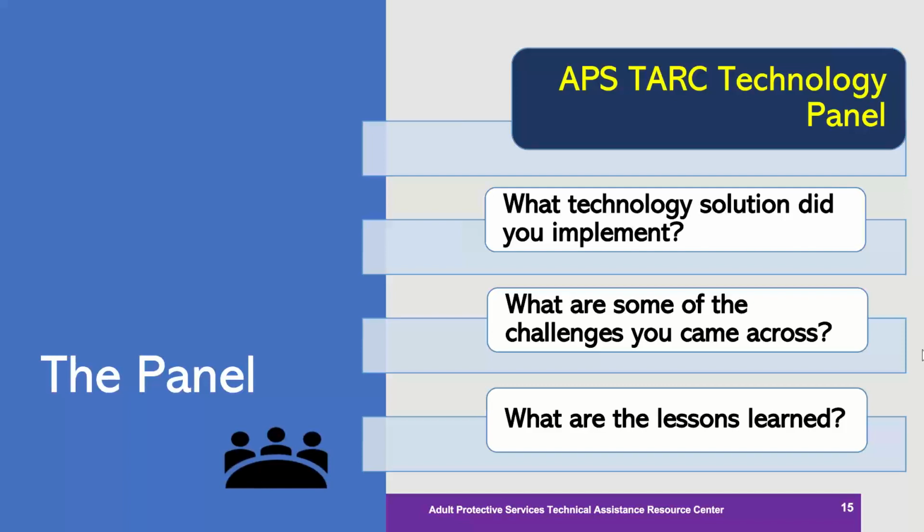So you need to find the right vendor, you need to find the right developer to help you with your project. And we did discuss getting buy-in and having all the people at the table, but I think for me a lesson learned is, while you want the right people at the table, don't have more than necessary, because that complicates the development process. I think you have to have some control over what gets presented to the developer, because the more people in the kitchen, the more expensive it gets and the more development hours you're blowing through.